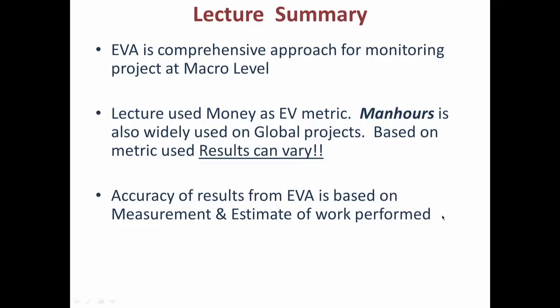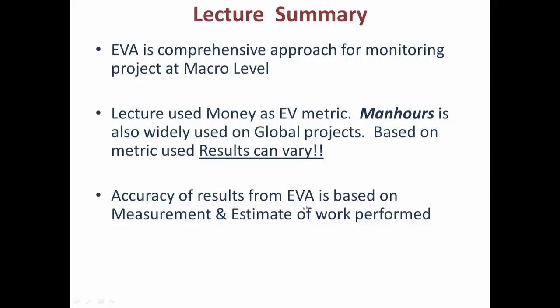More and more automated measurement is taking place. People can go to a site with a smartphone or tablet, enter values that are uploaded directly to the server with less chance for errors. Even more advanced are image processing techniques that automatically capture progress and update it. These are currently research areas but are getting there, and values are expected to be more accurate with such technology.